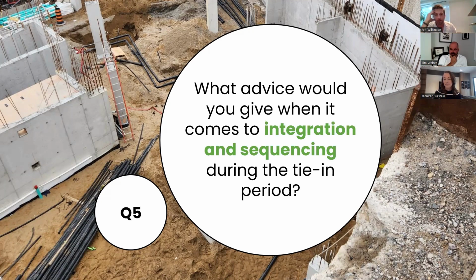Yeah, I would say, again, because Manderley is most fresh in my mind, it was kind of a corkscrew parking garage. In all the geothermal projects that we'd done before, I don't think we'd ever had a corkscrew foundation like that. And so the elevations really became important. Your cutoff elevations, also the structural engineer understanding your lateral elevations and how that relates to the footings, so we don't undermine the footings.